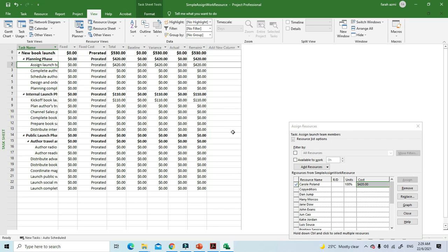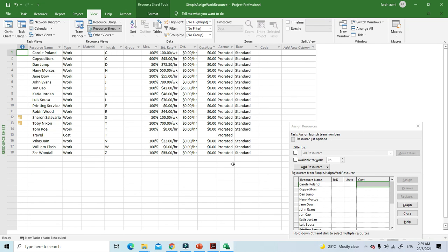To check the plan cost per resource, you go to the View tab again, then go to the Resource Views group, and click Resource Sheet. This is the way that you can check plan cost per resource. It's all automatic, since when you enter your costs, Project will calculate for you. So these are the cost tables up here, replacing the entry table earlier.